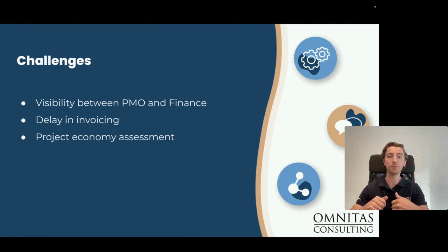So being able to follow up on that spend versus invoice of a project as that project is being executed, but also once we close that project, not having to wait months or even longer to finally be able to do that assessment, to see if that project was profitable, and of course take that into consideration for lessons learned from that project.